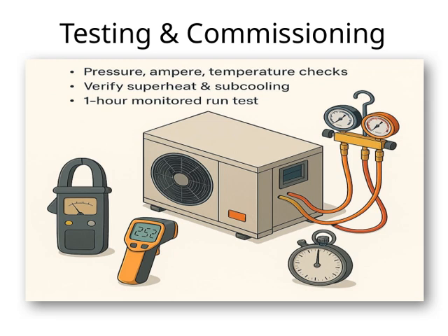Commissioning, on the other hand, is about fine-tuning and making sure all systems work together seamlessly in the real-world environment. We conduct operational tests, troubleshoot any issues, and adjust settings as needed. This process not only confirms that the project is ready, but also helps us identify and resolve potential problems early, saving time and costs down the line. Overall, testing and commissioning are the final steps that assure quality, safety, and performance. They are essential for delivering a reliable and efficient system that fulfills the project's goals and our clients' expectations.